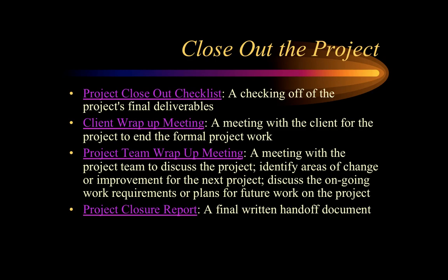Closing out the project, last but not least, is that after the project has pretty much been executed, then you're checking off your list to make sure everything was done. You meet with your client to wrap up, and the handoff. The team needs to meet just to debrief and figure out what went right, what went wrong, and then of course you write a final closure report that is submitted to your sponsor and your client.